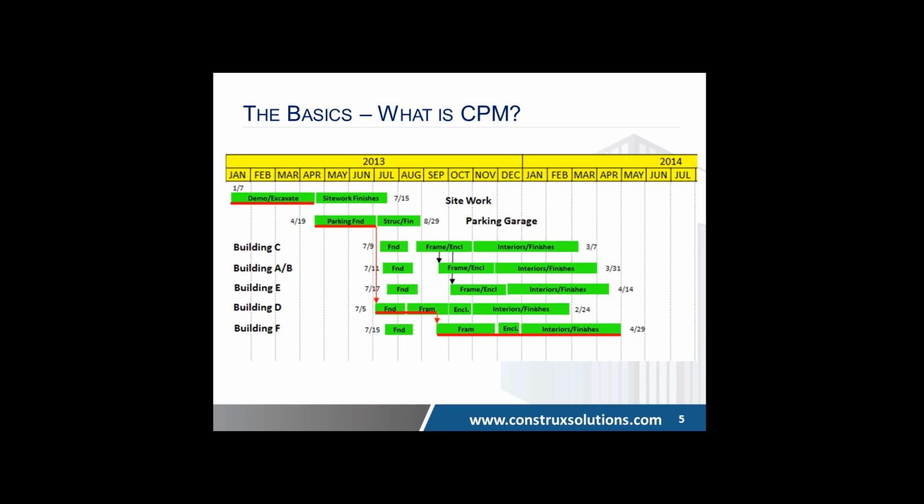This parking foundation was right in the center of the site, so they wanted to get that in first. It was a big concrete structure, so that's where the concrete sub would go, spend 2.5 months on the concrete structure, at which point, once that was complete, these 5 buildings, their concrete pads, their foundations, would be installed all simultaneously. So the plan was to basically, within the next month after that, put all these building pads down, and then framing could start.